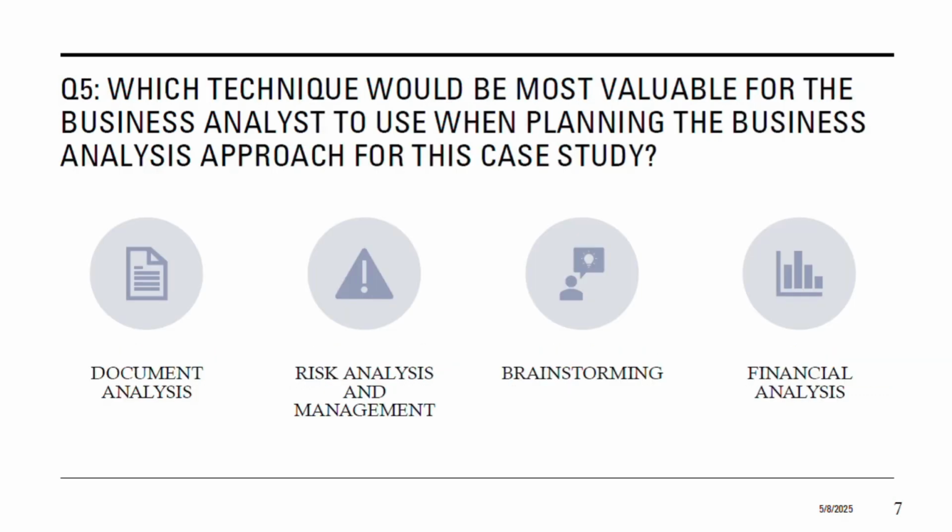Let's move to the next question. Question 5. Which technique would be most valuable for the business analyst to use when planning the business analysis approach for this case study? This question is technique focused. Risk analysis and management is the most valuable technique here. It helps to identify the potential pitfalls like the unfamiliar market and a tight deadline, allowing the team to proactively plan how to address these risks. The answer is risk analysis and management.